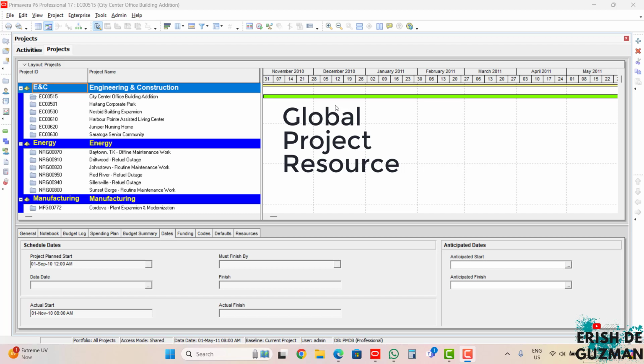For project calendar, these calendars are only available to the projects that they are created in. This type of calendar, the project calendar, can only be created for a project when that specific project is open. So that's the difference between global and project. Global, again, covers all of the projects and resources, while the project calendar covers only the one specific